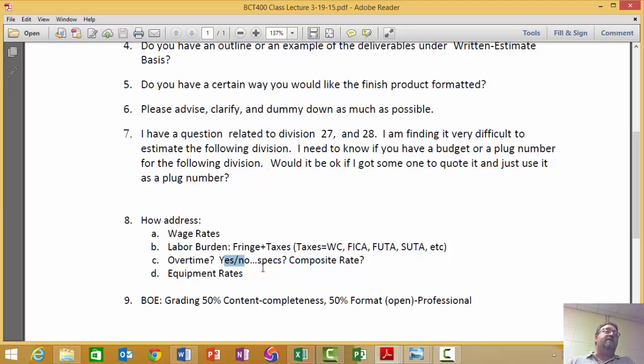I know one of them is a replacement for an existing hospital, and you don't have free reign of the site. So you're not going to be out there at 5:30 in the morning jackhammering old footings out, or the people in the intensive care unit are going to freak out. So check your specs for some of that stuff.